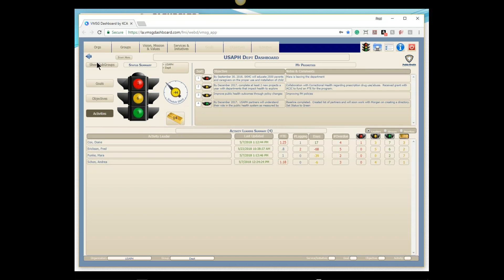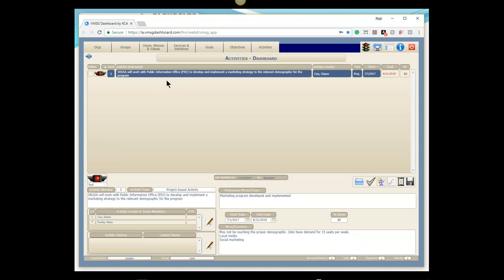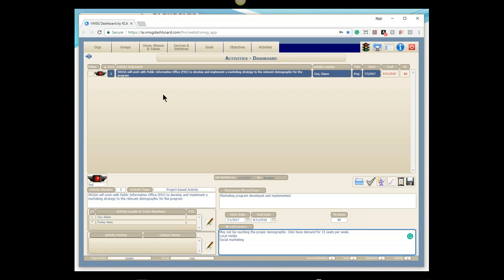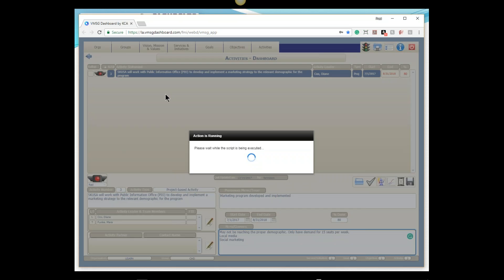In the top left corner is the big picture. Looking at activities, I can see 14 completed, 9 in green status, 6 in yellow, and 1 in red — all real time. I can click on anything on this screen to drill down. Clicking on the red activity takes me directly to it — in this case it's the PIO office activity. I'd go down to the notes, look at what's there, and make whatever adjustments are needed to get it back to green.